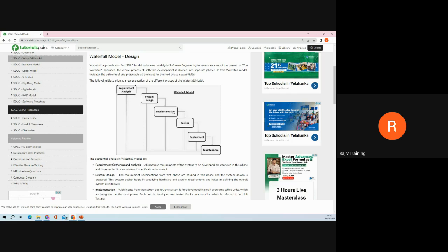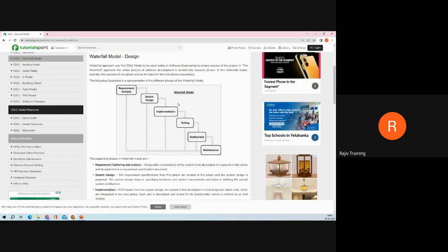Now I'm telling you, it's a pain for the user to create a username and password manually. Why don't you give an option for the user to register directly using their Google account? That means there is a change in requirement, which means we have to go back to the first step, redo the requirements, baseline it again, redo the design, baseline it again, then come to implementation again.